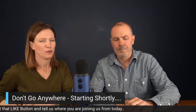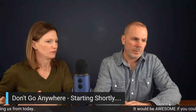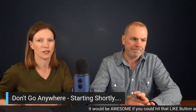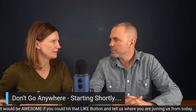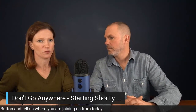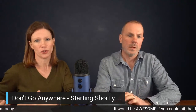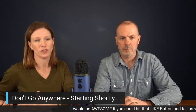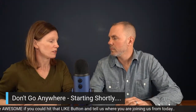Right. And that enables us to take into account things like drainage, and views, because again, we're in that coastal area. We really want to maximize any type of indoor, outdoor living space and those views. So really having that site survey is something we try to get sooner in the process rather than later. That's a really important step in the process that we've adopted.